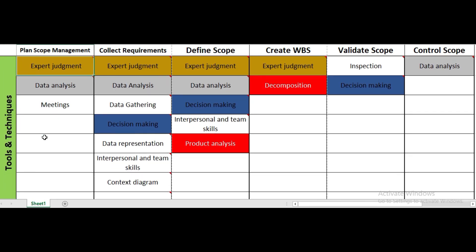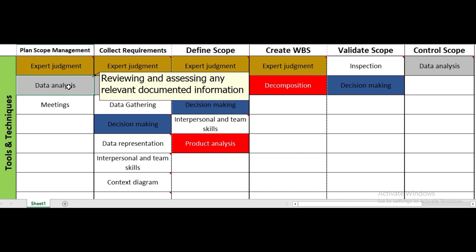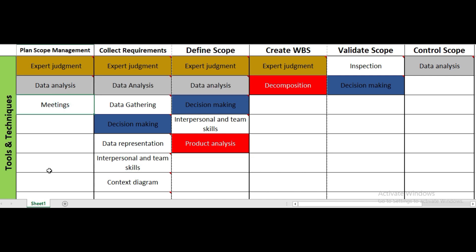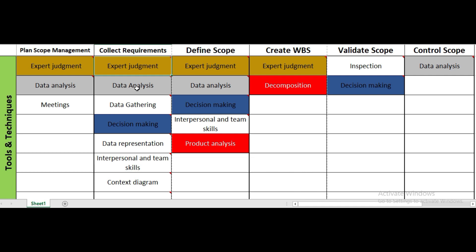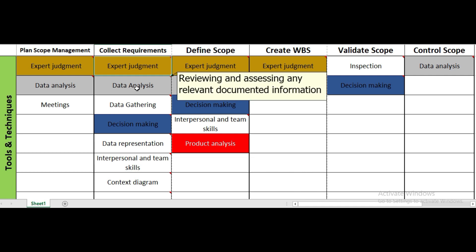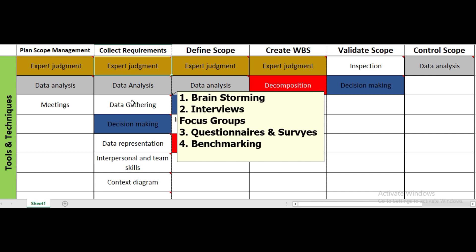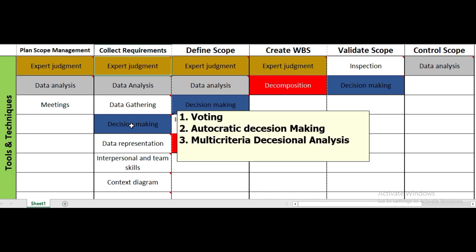In plan scope management, the tools and techniques are expert judgment, data analysis — which involves reviewing and assessing all documents related to scope management — and meetings to develop the scope management plan. In collect requirements, we use expert judgment, data analysis, and data gathering methods such as brainstorming, interviews, focus groups, questionnaires, surveys, and benchmarking. Decision-making techniques include voting, autocratic decision-making, or multi-criteria decision analysis.